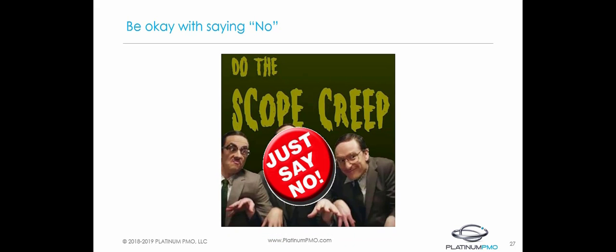Sometimes a change request may come up that clearly does not add value to the program or may even negatively impact the work of your program long term. In these situations, it's okay to say no. Clearly present your case to your client and discuss the best way forward. If a client is set on making specific changes, consider compiling the request into a separate project you can begin once you complete your current project. This will enable you to stick to your current agreement rather than continually making changes along the way.